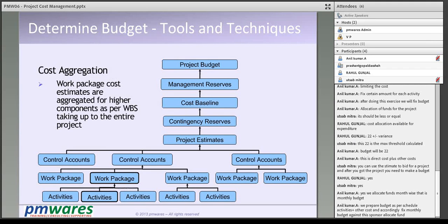Okay, so this is an aggregation. If I correctly tell, this is a pre-budget activity to reach the budget, the fund allocation, to decide on the allocation. So you have activities, you allocate, you aggregate them up to the project estimate. Then you define contingency. Contingencies are normally for risk mitigation, or simply say risk response. Risk response is the right word.